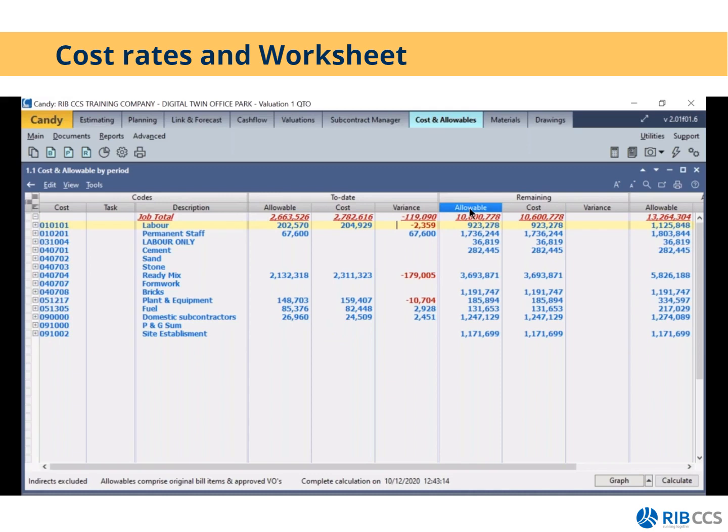The remaining allowable, all that Candy does is it takes your actual quantities that you filled in and your final quantities that we put in. Final less actual generates your remaining, and your remaining quantity times your net worksheet then generates your allowable remaining, and your cost remaining will then be your cost worksheet times your remaining quantity.